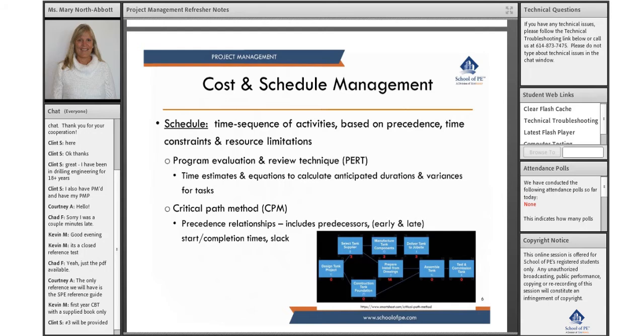Another method that you probably use, whether you've called it critical path method or not, is really about what your predecessors are, what has to happen before something else happens, how much time it can take, but you also have to build in that slack time, whether it's this equipment may or may not get here by the week we want to start it. Is it going to lag by a week? Is the potential time in there 2 weeks? So what can we be doing in tandem that may not have to have that task done?